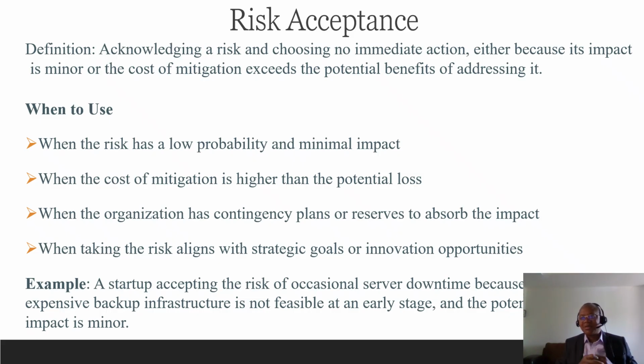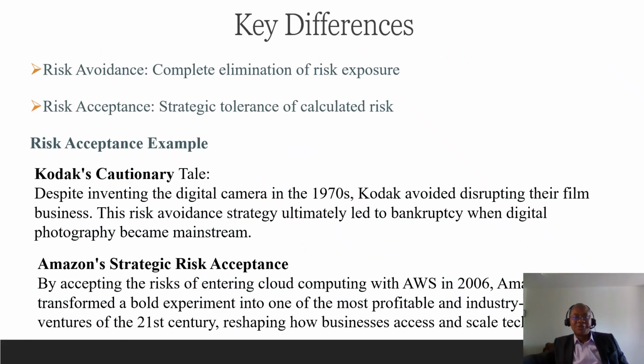For instance, a startup company accepting the risk of occasional server downtime because investing in expensive backup infrastructure is not feasible at an early stage of the business, and the potential business impact is minor if the server fails. Under these circumstances, an organization can choose to say, well, we accept the risk.